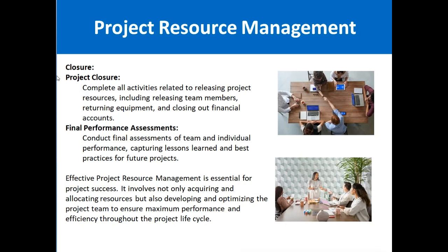Then final performance assessment means conducting a final assessment of team and individual performance, capturing lessons learned and best practices for future projects. Basically, friend, lessons learned is a document in which we mention all the things, positive and negative. If something goes well, we have to mention it. If something goes wrong, we have to mention it as well, because the positive things should be continued in future projects, and the negative things should be avoided. So this is the main objective of lessons learned.